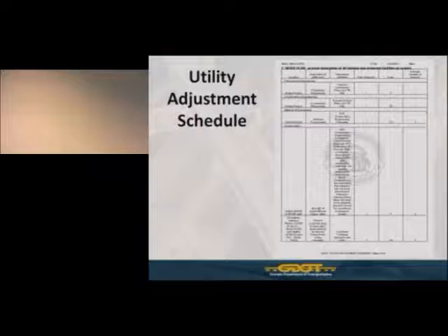And then the next phase of work, they've got place 8 overhead guys, 8 down guys, and 8 anchors to new Georgia Power poles being relocated. And you notice, just like they identified in section B, special requirements, a dependent activity is Georgia Power Company placing 8 new poles. Again, for this project that may not be an issue. If it was more poles, there probably would be a question as to why you couldn't do part of the work as Georgia Power completed their pole installation. It would just be a question and some clarification needed.